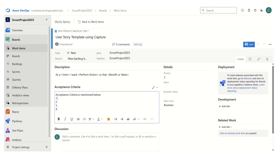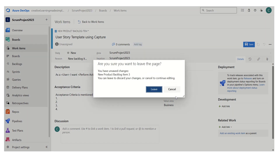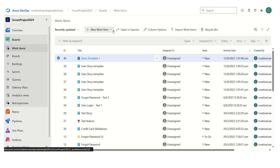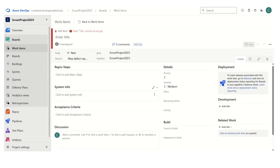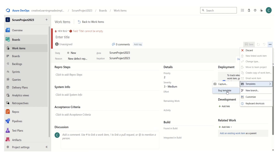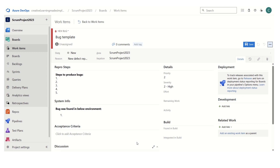If we have to utilize this particular bug template, we go back to Work Items and instead of selecting the product backlog item, we select bug — let's say we have to log a new bug. If I'm not sure what all goes where, I can come to templates and capture the bug template. Azure is such a nice tool that based on the work item we want to create, it gives us the relevant template. Since the bug template is only for bugs, we are not getting the templates defined for PBIs or user stories. If I select bug template, this is how it will populate.